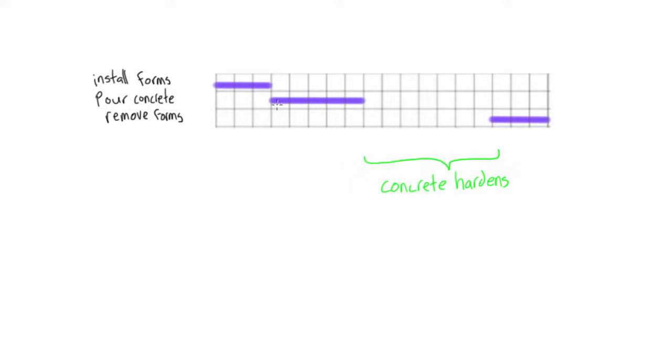And we can pour our concrete right after we're done installing the forms, but then we have to wait some amount of time, for example, before we can remove the forms while the concrete's hardening.